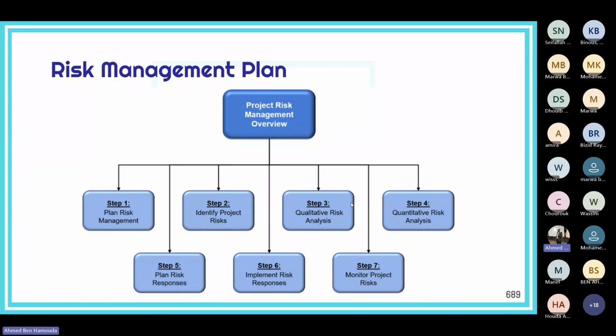A risk owner is the person that is the most qualified to watch after this risk, ensure the implementation of the plan is happening, is actually following up on the risk, continuously calculating if there are any changes in the probability or the impact levels of that risk, etc. Okay, and that person should be able also to report during the risk management meeting, which takes place maybe once in a week, or during the project status meeting, together with the project manager and the project team.